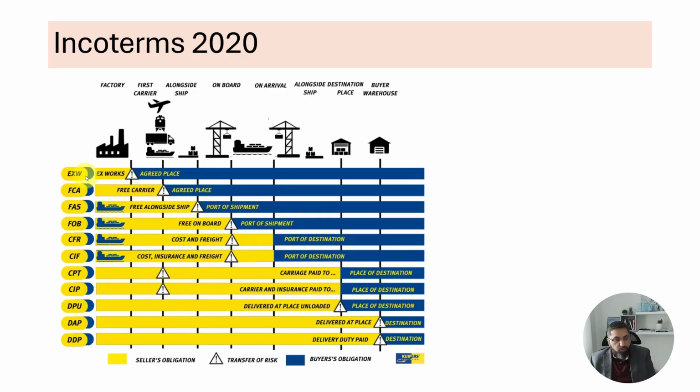And what can actually happen is when you are trying to find a supplier and different suppliers give you the price they're going to charge for the goods, you can't select a supplier on that price if the price is an Ex-Works price, because different suppliers have different locations and it's going to cost you different amounts to move the goods from the supplier to your facility or to a port in their country where it can be shipped, and then the rest of the way for whichever supplier you pick, the journey is the same, so it's going to cost the same.